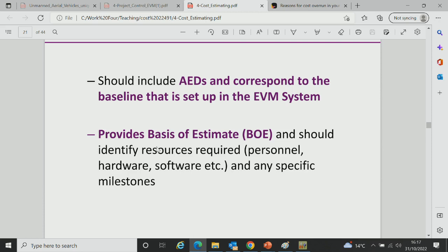So you do those things to simplify your cost estimate. Exclusions, you're saying, okay, this cost estimate does not include overhead. Or this cost estimate does not include the assembly cost, which is done by a contractor, for example. So you put in your exclusions, what is excluded, also what is included. So you're very clear about what is in the cost estimate.